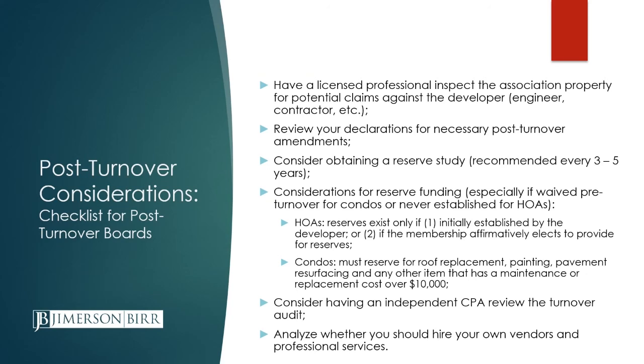But the last thing you want to do is figure out that you've got some construction defects in your property many years after turnover has occurred. So you can hire an engineer or a contractor to come out and tell you if the building was constructed in accordance with building code, or if there's any issues with the property. And there may be some small issues that the association decides that they're either going to make a warranty claim on, or if they're unable to get the developer to agree with them on the warranty claim, that they just pay for themselves. Or you might find that you have some really significant problems.